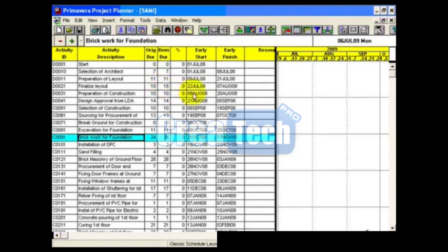In this you can also add more than one successor for an activity. It all depends on the project manager. He can understand and visualize how many activities he can start at a single time. So let me add 3 activities in case of covering of first floor.